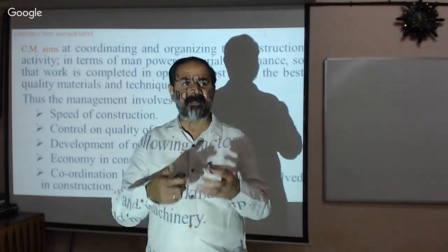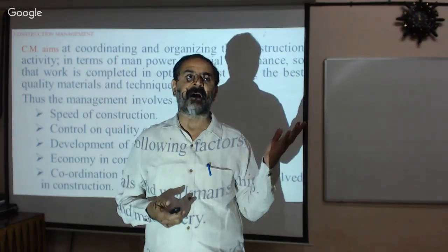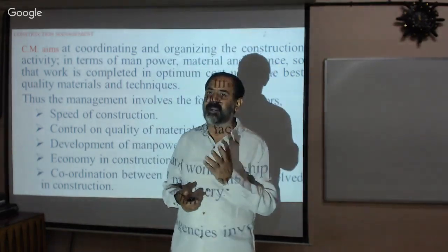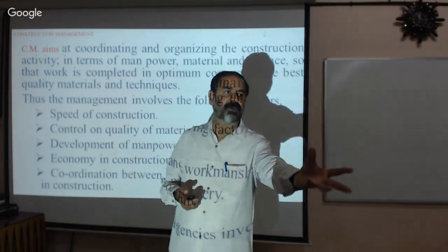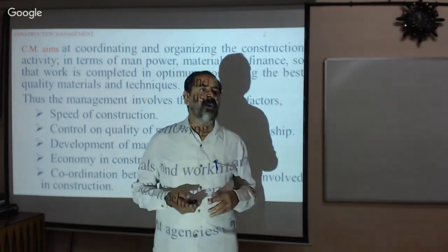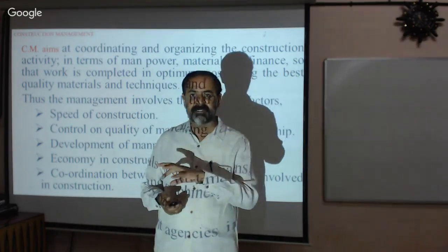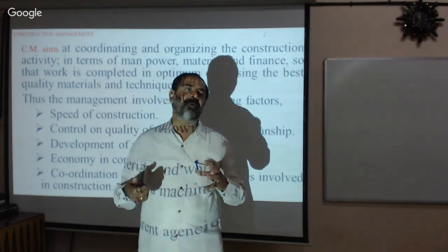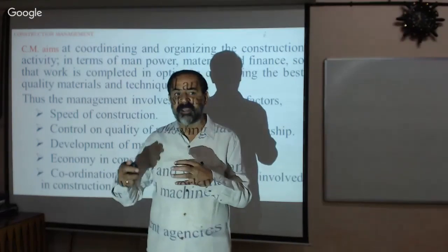Now technology is available. You just order ready mix concrete. There are many operators manufacturing concrete who will supply it to you. Within half a day you can complete the job, without procuring the material, the machines, or the men. That is how we have to exploit the technology.